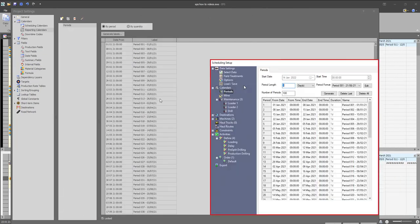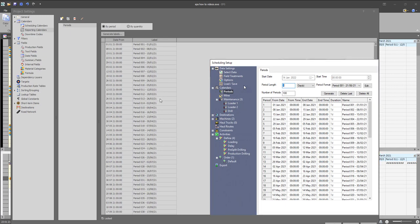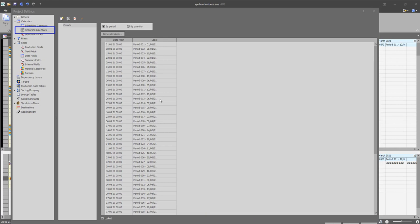The calendars that you define under the time periods on Studio OP, which happens to be one of the minimum requirements for the linking, can be found under the reporting calendar on the project settings on EPS.